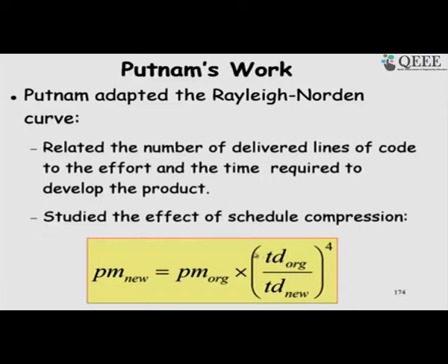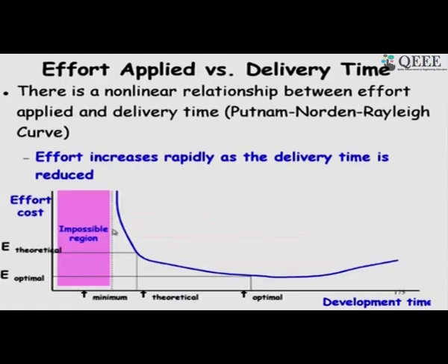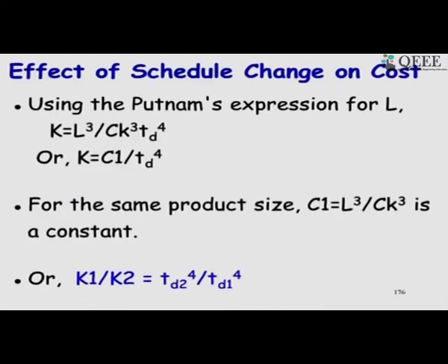In the nominal effort equation, all developers are busy, and that is the least effort it takes in the nominal development time, that is the original effort. If we want to reduce the development time, we will need a disproportionately high effort, because we will not have that many parallel activities to keep the developers busy. And also Boehm's result said that if we reduce it by more than 25%, then it will become impossible to do it.